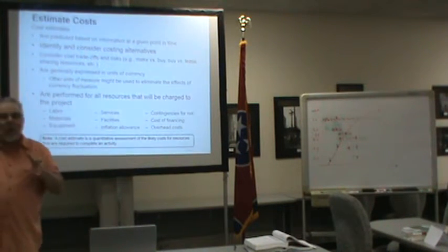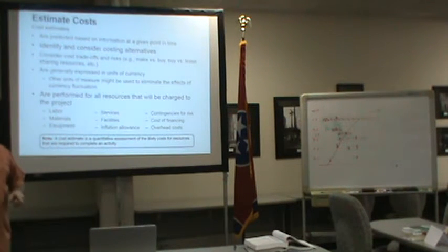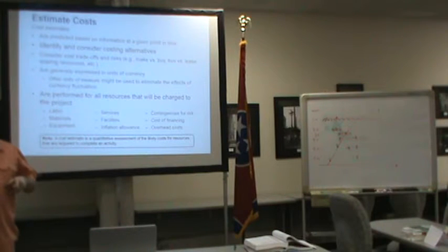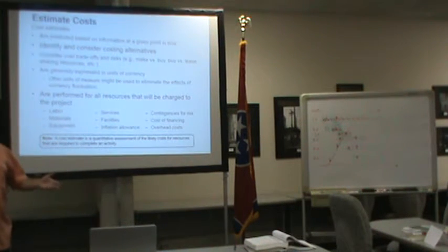And do I want to talk to the guy who's running the HIFER about estimating jobs in the HIFER? Probably not, right? Who do I want to talk to? People on the bottom. The craftsman, the crafts person. That's who I want to talk to because they know how long something really takes. They know, hey, if you guys are going to force me to wear 3 pair of gloves and change my boots out every 30 minutes, then it's going to take me a long time to do this job. But I can tell you how long it's going to take.